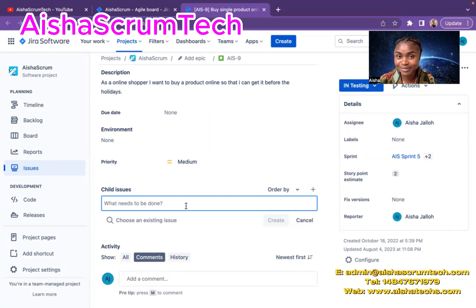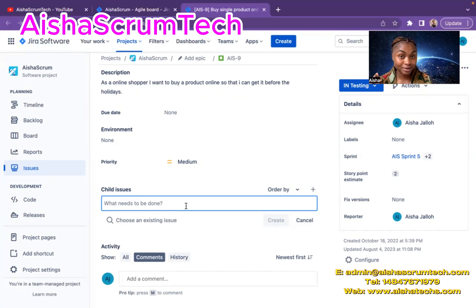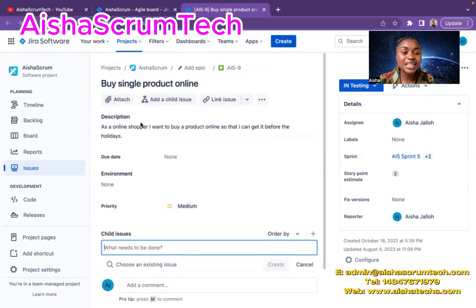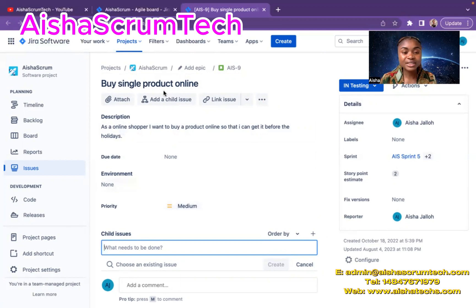It becomes a problem when, in a particular active sprint, we have a sub-task in an active sprint but the parent story is in the backlog. That's a problem, because that means you're basically working parts of a task without looking at the overall value of delivering that particular story. What do I mean by that? So let's say I just created this child issue.